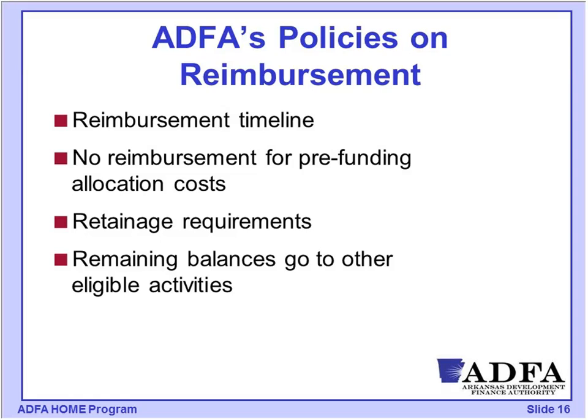The purpose of the retainage is holding back some amount of money so that in the case where you have difficulties, or there are things that need to be corrected on the project, you have a little bit more control because you're holding back some additional money. So we're not going to release that final retainage, which is cumulative from all the draws in the project, until that final inspection has been completed. We know that everything has been addressed, and then 30 days after that's been completed, that final payment would go to the vendor for that project.